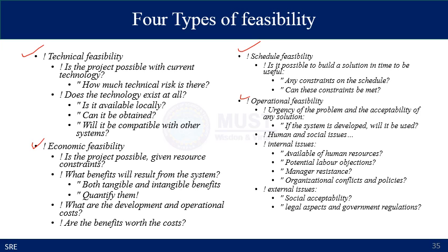And along with that, you have to conduct economic feasibility as well. That is, whether or not you have the resources to make the project possible and what benefit will result from the system, both tangible and intangible benefits, and you have to quantify the end product gains. So what are the development and operational costs and what are the benefits, what is the worth gain and what is the worth lost.